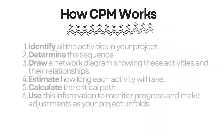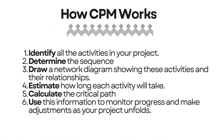So how does CPM work? The critical path method works in six simple steps. Firstly, the identification of all the activities in your project. Secondly, the determination of the sequence. Thirdly, the drawing of a network diagram showing the activities and their relationships. Fourthly, estimating how long each activity will take. Then calculating the critical path. And lastly, using this information to monitor progress and make adjustments as your project unfolds.